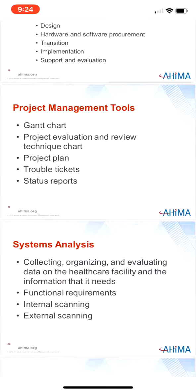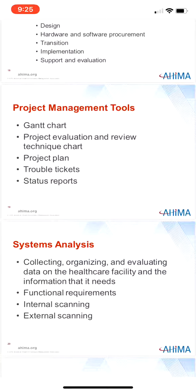A PERC chart — see Figure 4.3 — is a management tool that evaluates the task, the dependencies on other activities, the activity sequence, and the time required to complete the task. Because the PERC chart shows interdependencies between tasks, it will help determine whether the implementation date is slipping because of delinquent tasks. This slippage is shown by review of the critical path, which shows the longest amount of time to complete the project. If key tasks along the critical path are delayed, the critical path itself lengthens, thus lengthening the duration of the project.